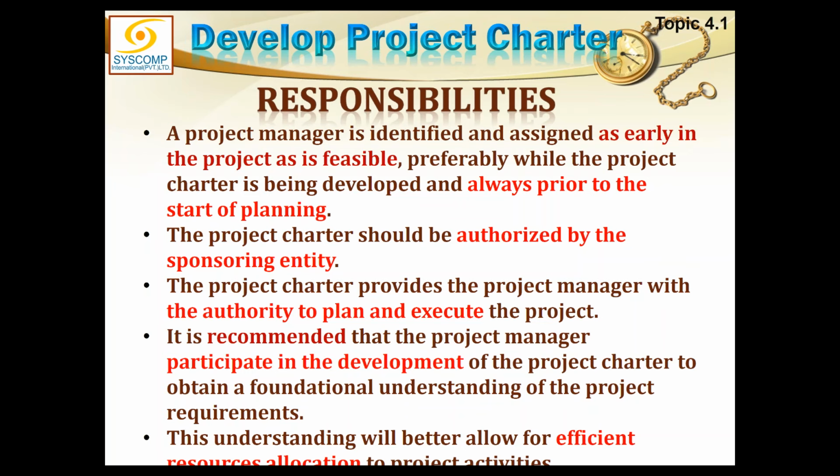You should not have appointed a project manager 6 months earlier or 10 years earlier, and always prior to the start of planning. He should definitely be there before he sets out on the job of planning. You can't have planning done by someone else, and then the project manager assigned after 3-6 months. That is also not feasible.